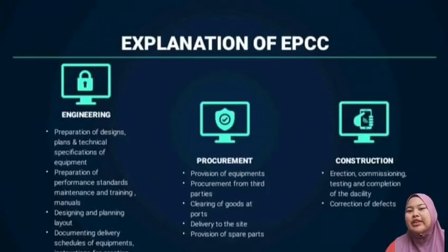Hello, I'm Intan Faizatul. So now I want to talk about the explanation of EPCC. The first one is engineering. Engineering is the preparation of designs, plans, and technical specification of equipment. The second is preparation of performance standards, maintenance, and training manuals. Third, designing and planning layout. And the last one is documenting delivery schedules of equipment and instruction for erection.